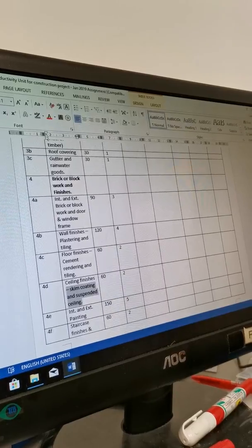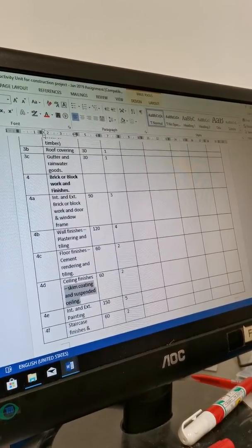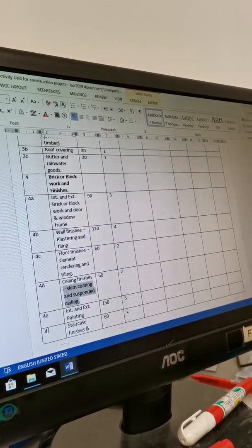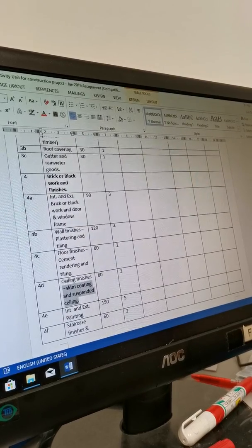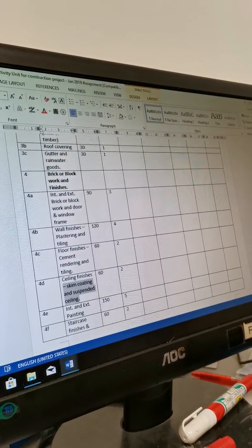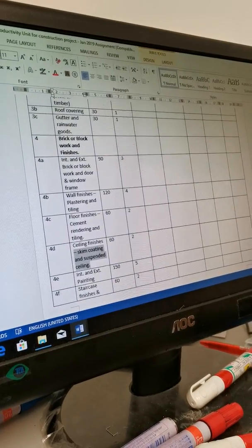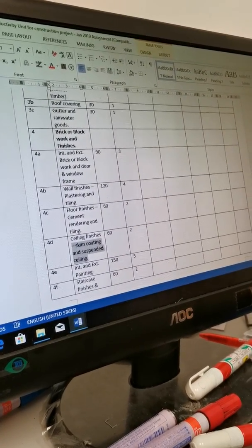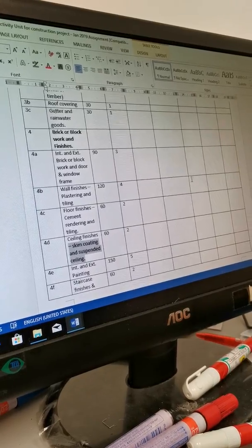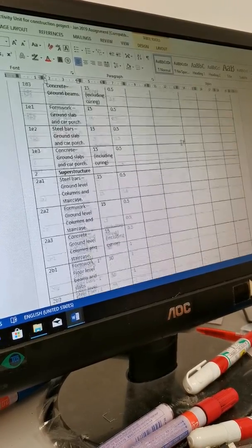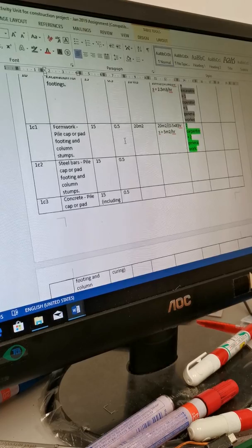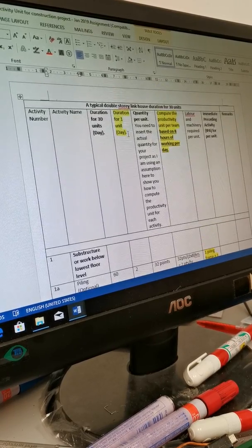Try to avoid using analysis too often, because I want to see your logic sequencing. Even analysis, you need to sequence them also. You can't run one. Because the duration is all there to control how long to finish a particular one. So this one is not units per day. No, this one is how many days you finish one unit.